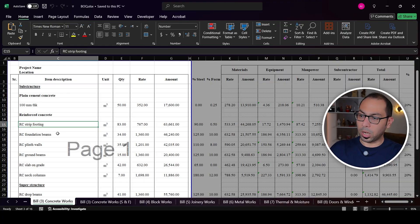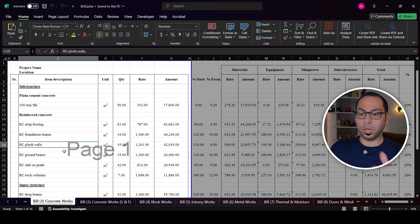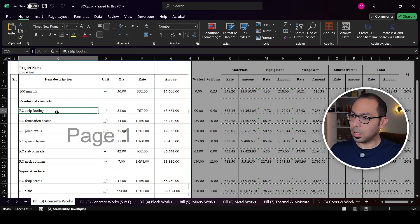When the BOQ is measured like that — everything combined into one item — for something like plinth walls, I need to estimate concrete casting, steel and fixing, and formwork installation all together. But the BOQ only gives quantities in cubic meters. For example, strip footing: 83 cubic meters. I can estimate concrete supply and casting for the 83 m³, but I don't know anything about the steel or the formwork. So what should we do?